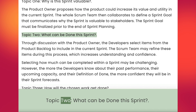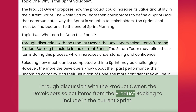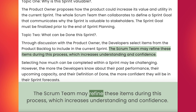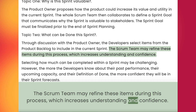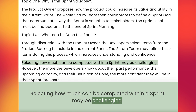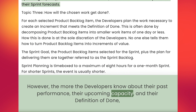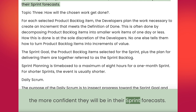Topic 2: What can be done this sprint? Through discussion with the product owner, the developers select items from the product backlog to include in the current sprint. The Scrum team may refine these items during this process, which increases understanding and confidence. Selecting how much can be completed within a sprint may be challenging. However, the more the developers know about their past performance, their upcoming capacity, and their definition of done, the more confident they will be in their sprint forecasts.